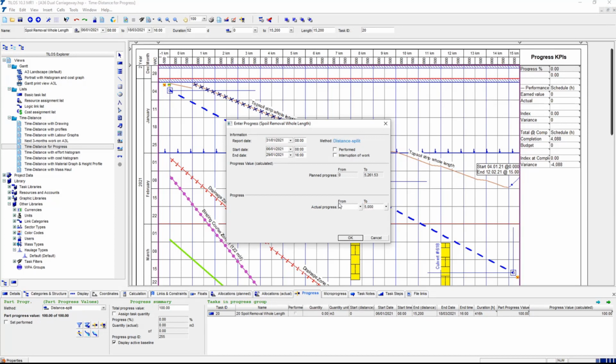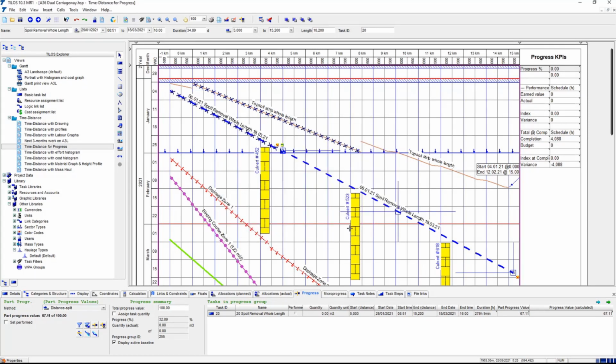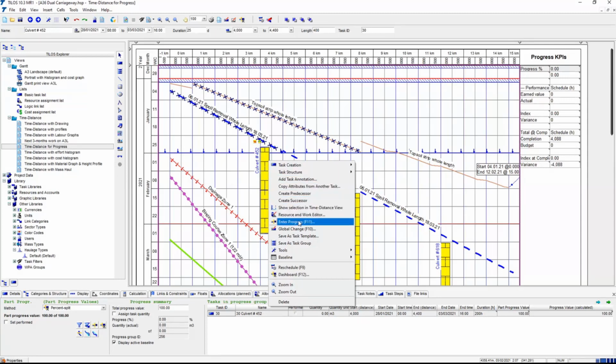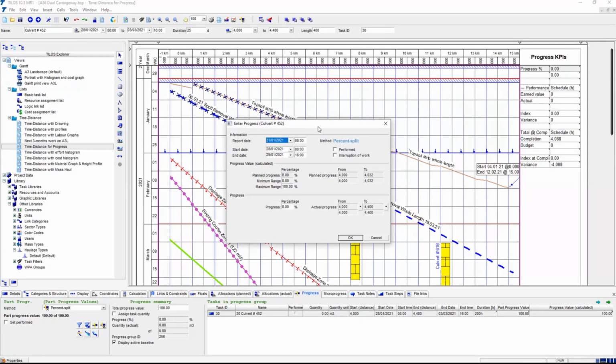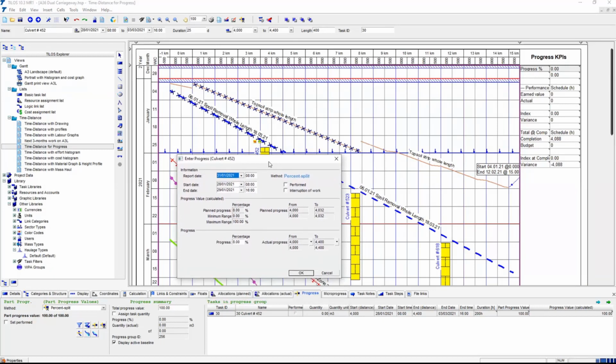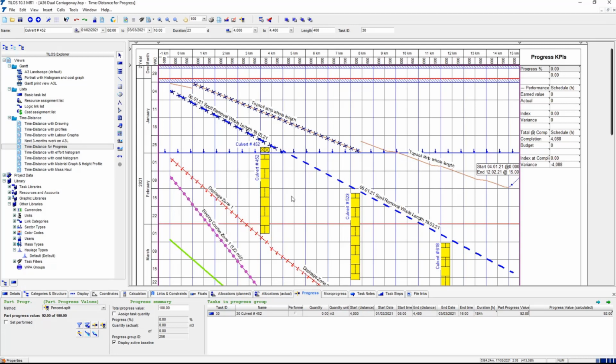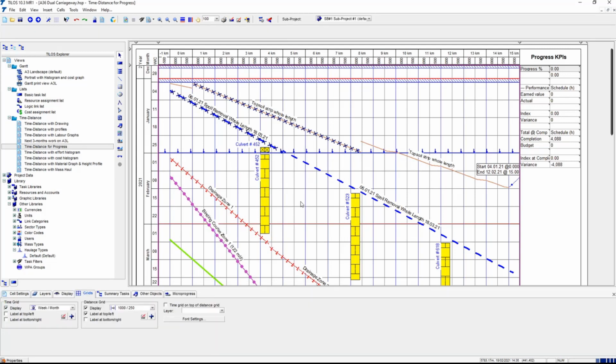We got to 5K, and we should have started the culvert, and we have. So when we've got, and so this is a non-linear task, so we should have done up to that point. That point represents 8%. We've worked between these. This is the actual start date. This is the actual end date of that bit, or if you like, the resume date of the next bit. So we chop up activities into little pieces, representing what they've done.